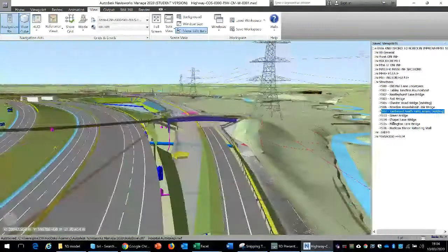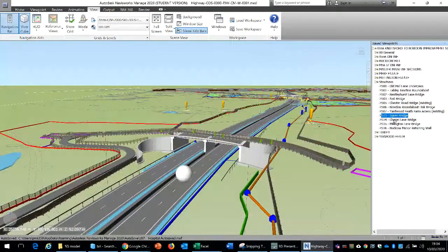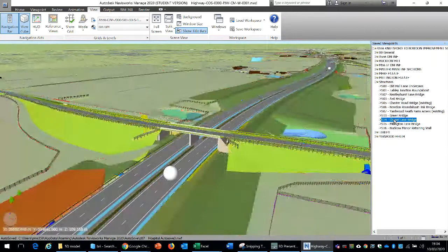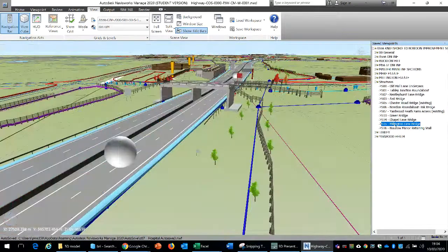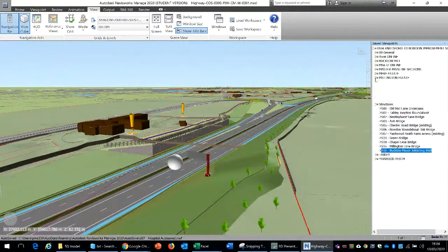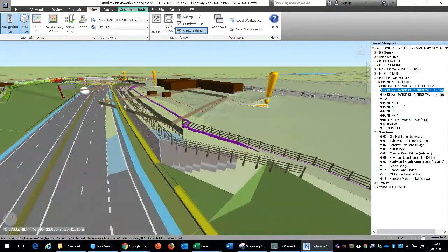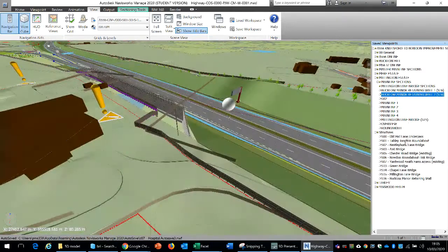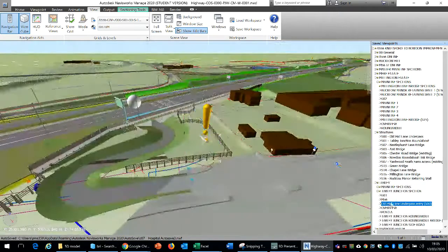Right. So a production environment such as this allows us to address a lot of problems which were inherent and an integral part of the traditional construction management, which includes problems in communication, problems in collaboration. So for instance, in one of our local schemes, we had a chance to look into the highway scheme. There were more than 1,200 RFIs just at the beginning of the scheme, and responding to each of those RFIs could cost more than £1,000 or so. So you could see the costs escalating. A preview of a good production environment would help put everyone on the same page.